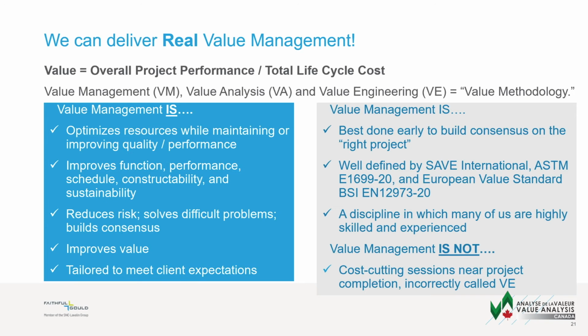It's well defined by SAVE International, ASTM E1699-20, and the European Value Standard BSI EN 12973-20. And it's a discipline in which many of us on this call are highly skilled and experienced. But one of the key points is value management is not a cost-cutting session near the project completion, which people incorrectly call value engineering. And even in my own firm, this is something that really bugs me because we have people doing this cost-cutting type of stuff, calling it value engineering, which makes it very hard for me to sell value engineering to that client on the next project.